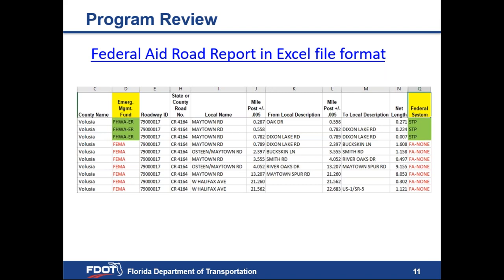Column D shows that the first three segments from mileposts 0.287 to 0.789 are FHWA ER, while the remaining seven segments from mileposts 0.789 to 22.683 are under FEMA. So following an emergency event, approximately half a mile of this roadway would be eligible for FHWA ER funding, while almost 22 miles would fall under FEMA jurisdiction. Looking at column Q, Federal System, those sections under FEMA say FA-none or Federal Aid None, which is additional confirmation they are not eligible for FHWA ER funding.